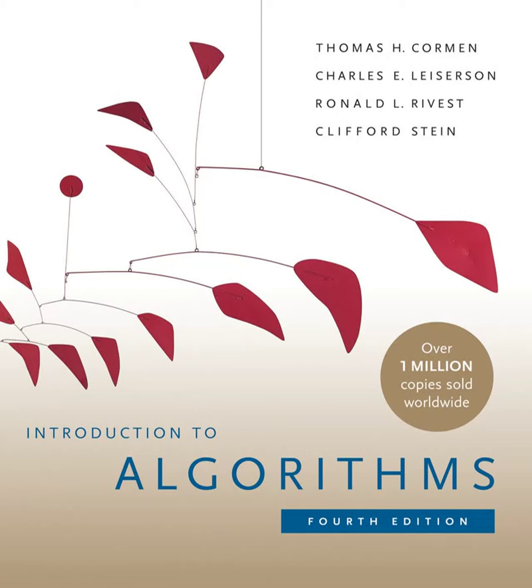Now, a critical problem is finding the critical path. Critical path. It's the longest path through the PERT chart. And this tells us the minimum time to finish the whole project. So it's like the bottleneck. Exactly. And we can find this critical path using a shortest path algorithm. Really? We just flip the signs of all the weights, make them negative. And then the shortest path becomes the longest path. You got it. That's so clever. It's a cool trick. So we can use DAG Shortest Paths to find critical paths. Yep. That's a real-world application.